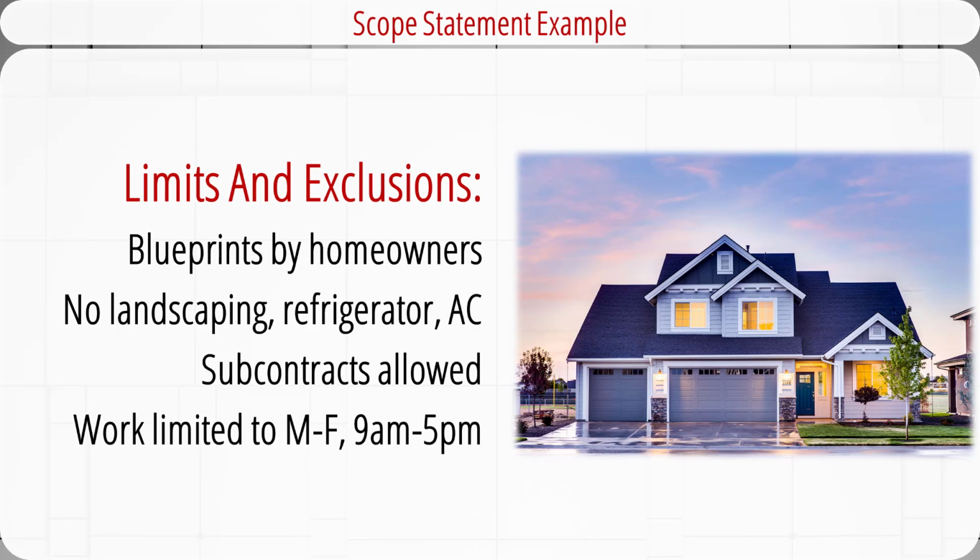Site work will be limited to Monday through Friday, 9 a.m. to 5 p.m. No nighttime work, so it doesn't disturb the neighbors. Finally, this scope statement must be reviewed and signed by John and Jenny Smith.